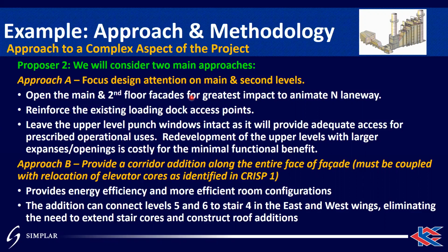We're going to leave the existing upper level punch windows intact because that provides adequate access for the operational uses that have been listed in the scope. And redevelopment of those upper levels with larger openings is not really a good value, so you're not going to gain much benefit there. So that's approach A.